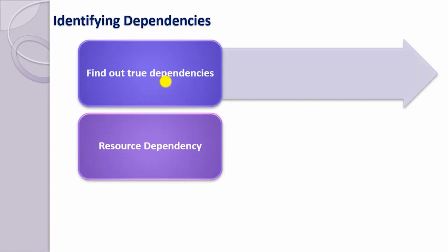So when we say resource dependency, how do you handle it? Because just keeping the dependency in check doesn't matter, right? You need to handle it. You need to find a solution, because resource dependency could be very risky in certain cases. For example, I have handled a two-people project which was running for years, three or four years. Even though it was a support project, if one resource goes on leave, the project work gets piled up.